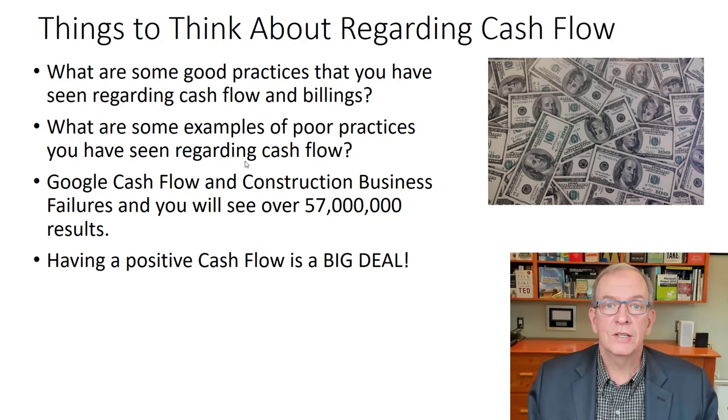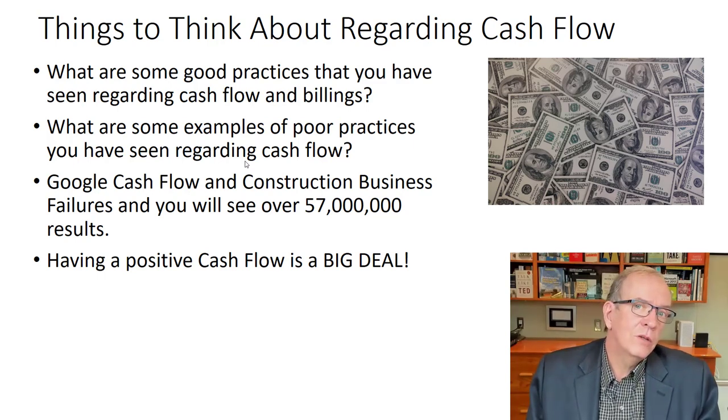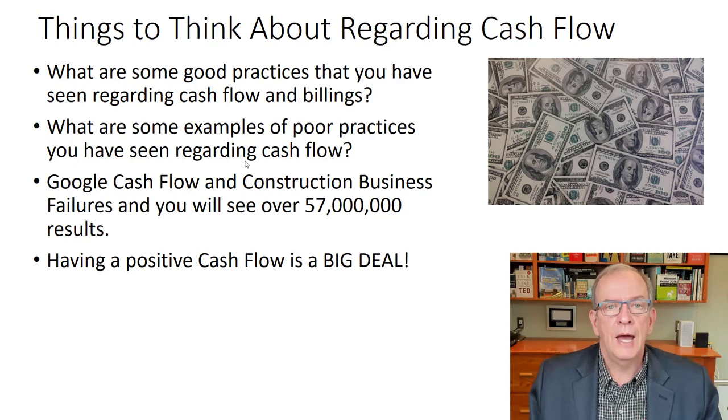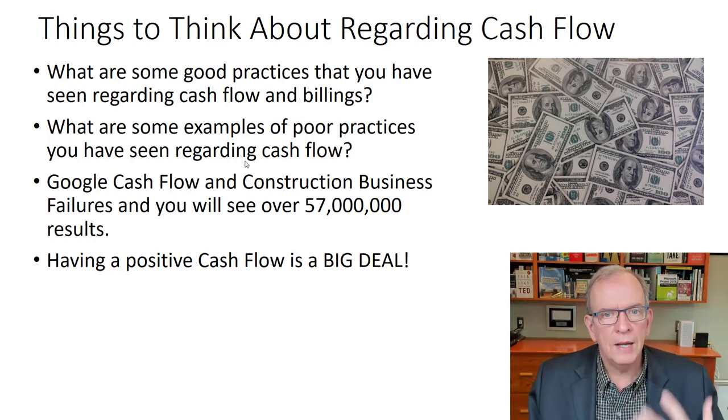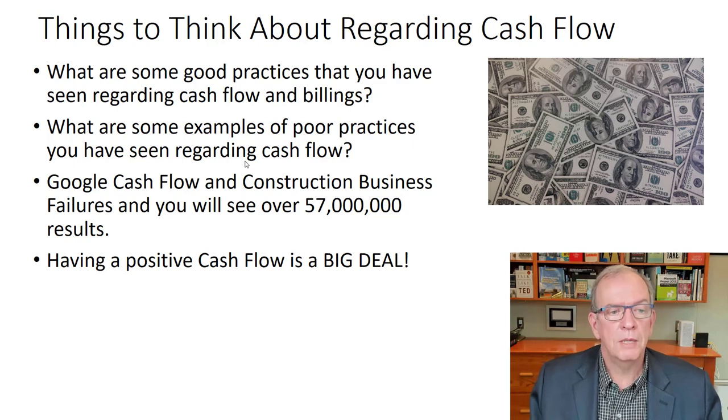And poor practices are where you let it slide and you let 2-3 weeks go by before you actually invoice. That is a waste because you could have had that money sooner. People are not going to rush to pay you when you're late in providing the invoice. So you've got to keep that in mind: are you invoicing on a timely basis?